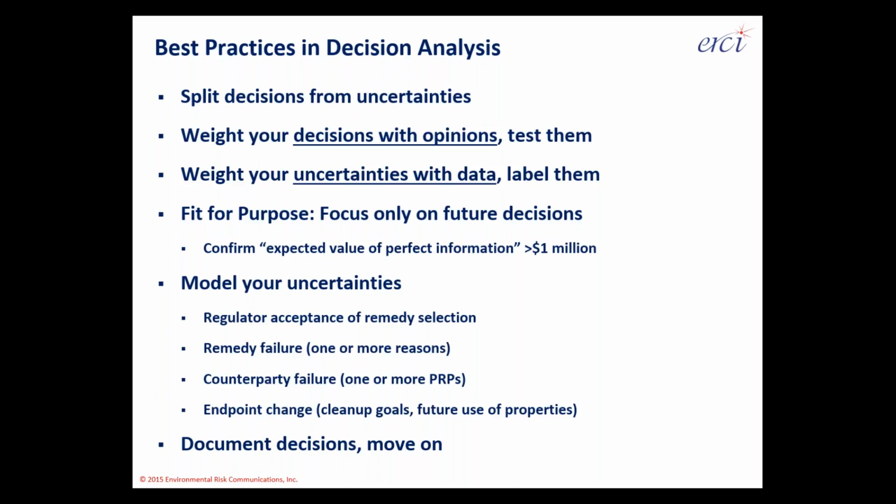Other external factors, like will counterparties fail? These are more knowable, more transparent, and actually easier to calculate than ever before. And then endpoint change. Will there be changes from the regulator's or public's perspective about what they think constitutes a good remedy? Finally, it's important to remember to document your decisions and move on. You'll want to move on to another site because it's not worth half a labor year to spend time on it and keep revisiting it.